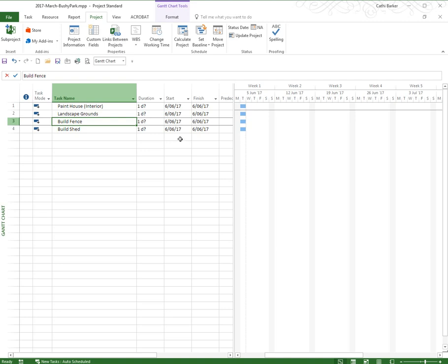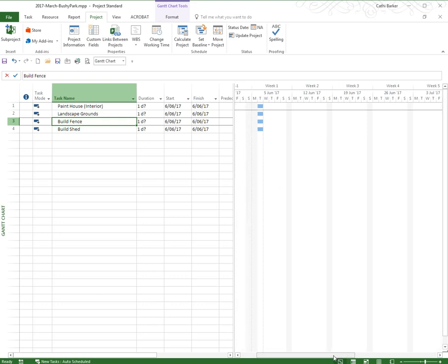It's also accepted the fact that we said we were starting on the 5th of June, but because it's a public holiday, it's saying that we're starting on the 6th of June. And each of those has a 1 day duration, and you can see here that my tasks show.